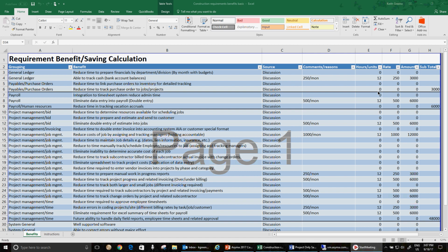Their jobs range from about $1 to $2 million on the bigger ones, and on those larger jobs, they do need to do progress billing with the AIA standards. The smaller jobs, they are doing completion billing just with regular invoices.